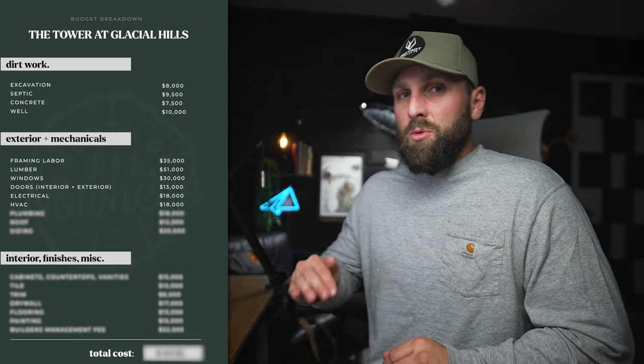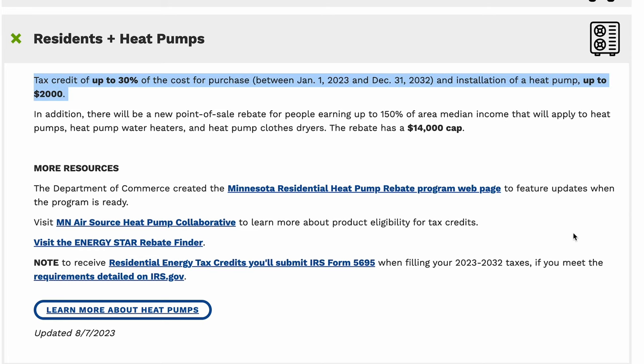HVAC is budgeted at around $18,000 as well. We considered a zoned system for the multi-level tower but that's much more expensive, so we're likely going to have one thermostat on the second level with Ecobee temperature sensors on the first and third levels to normalize the temperature. We're also doing a heat pump instead of a traditional AC unit — they're much more energy efficient and greener. Under the Inflation Reduction Act you can currently take a tax credit for a heat pump. We'll have a furnace too, but the heat pump supplements it so both work more efficiently together.